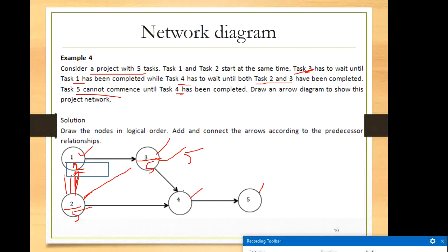You can start on the same day. Activity 1 can be completed in 2 days. Activity 2 can be completed in 5 days, right? So parallel means both are given resources at the same time and commenced and continuing. So 2 plus 5, 7 days. This line, 2 days plus 5 days, 7 days to take to go to activity 4. So activity 4 you can start, if it is started today, after 7 days you can start activity 4.